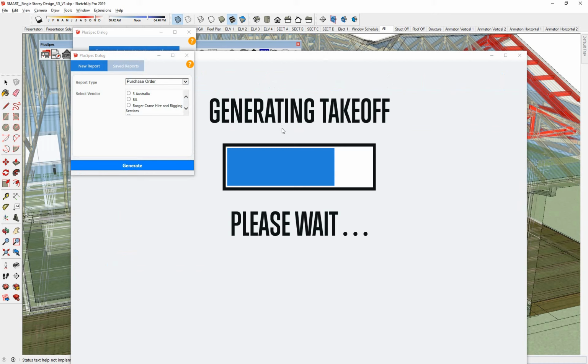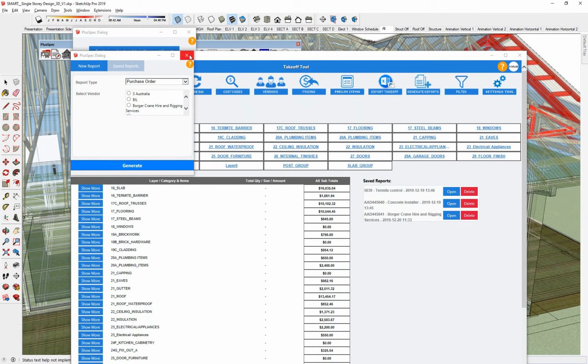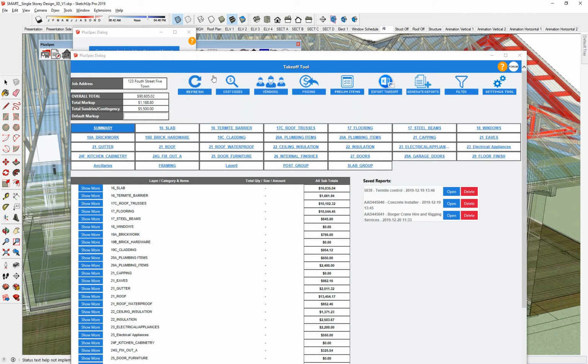Now I do know when I was building, the more purchase orders we created, the more organized we were. So for instance, if I was busy doing a whole heap of things, here's my purchase order here. If I was doing a lot of work, it's very difficult to get time to go and make a phone call and then send over some documentation to say, hey, we're going to pay you for this job. If it's done first and you follow through each tab and create your purchase orders accordingly, you'll be so much more organized at the point that it comes to delivering the project.